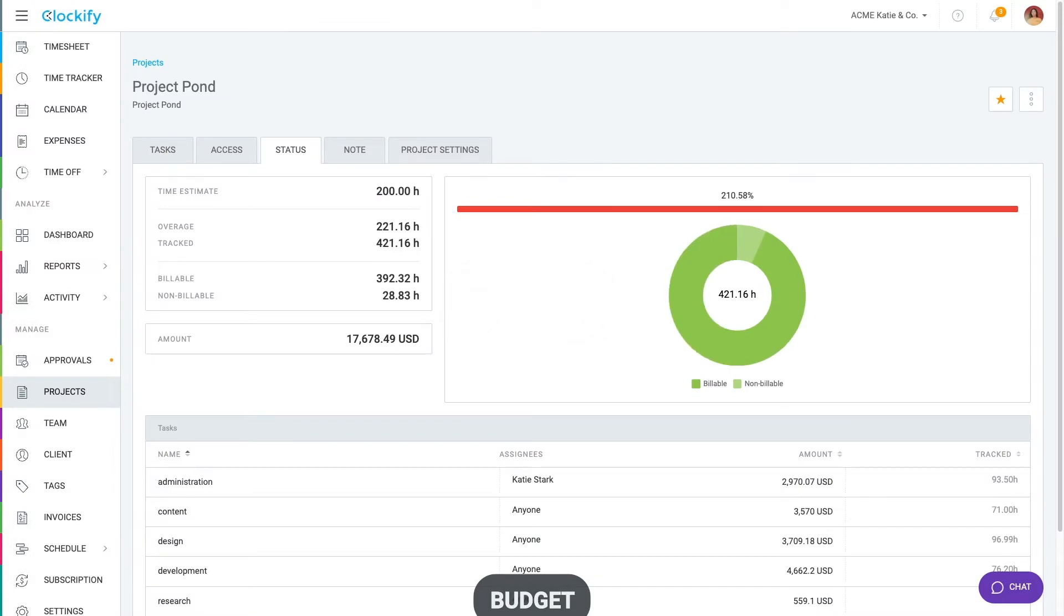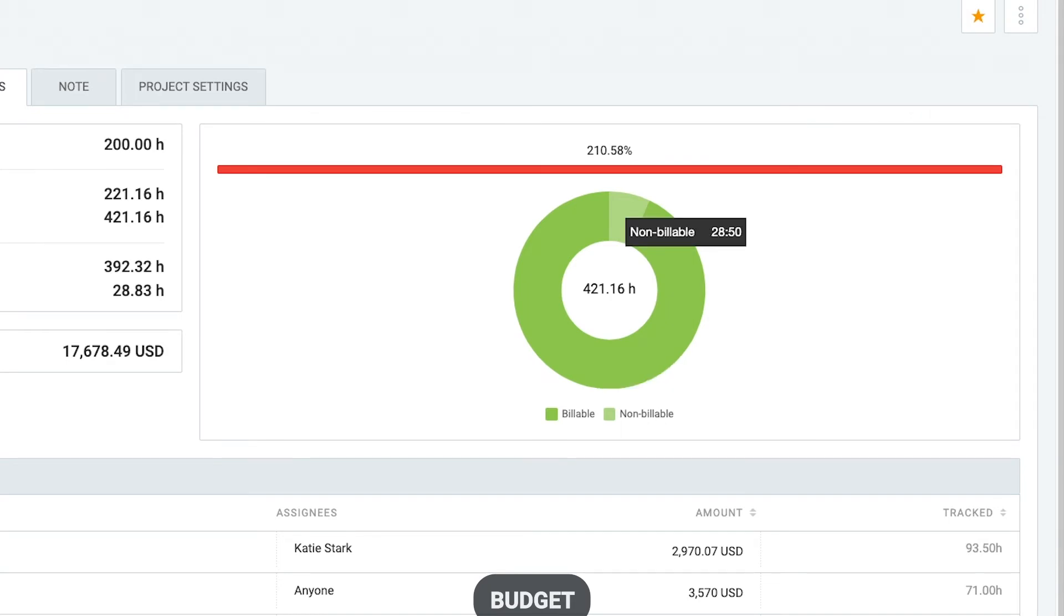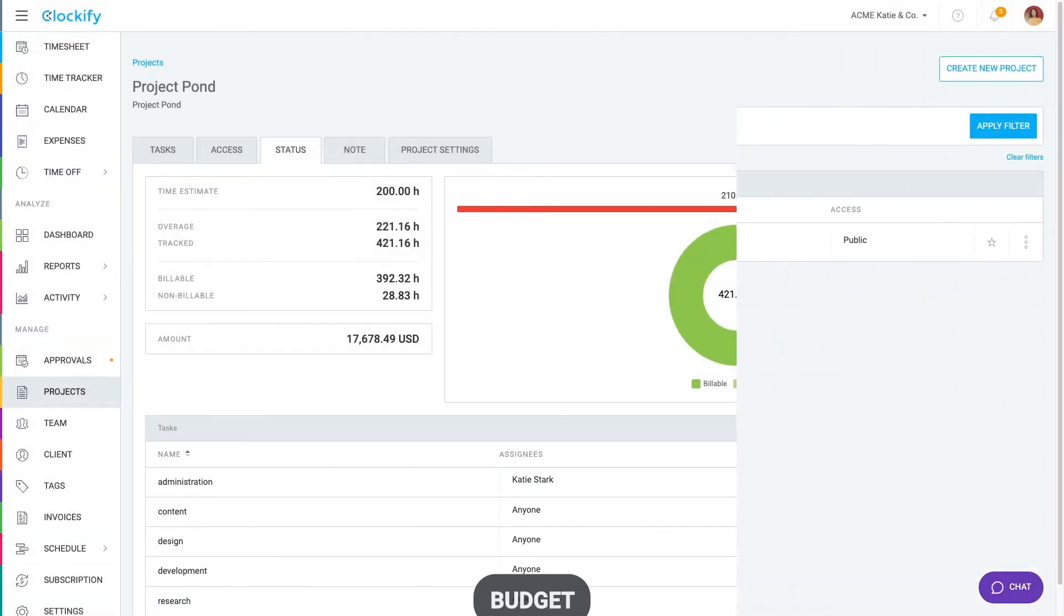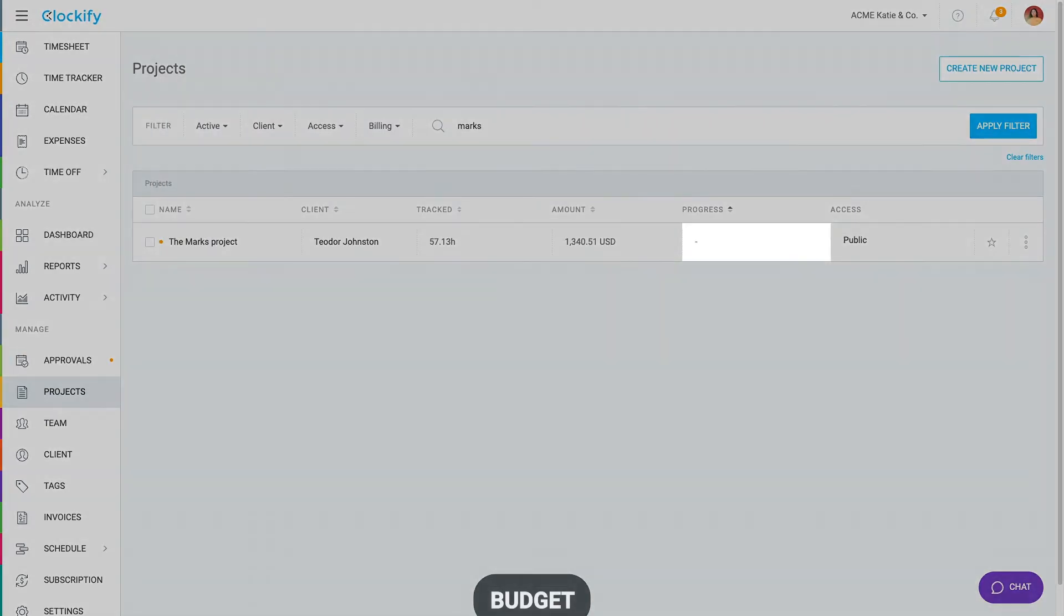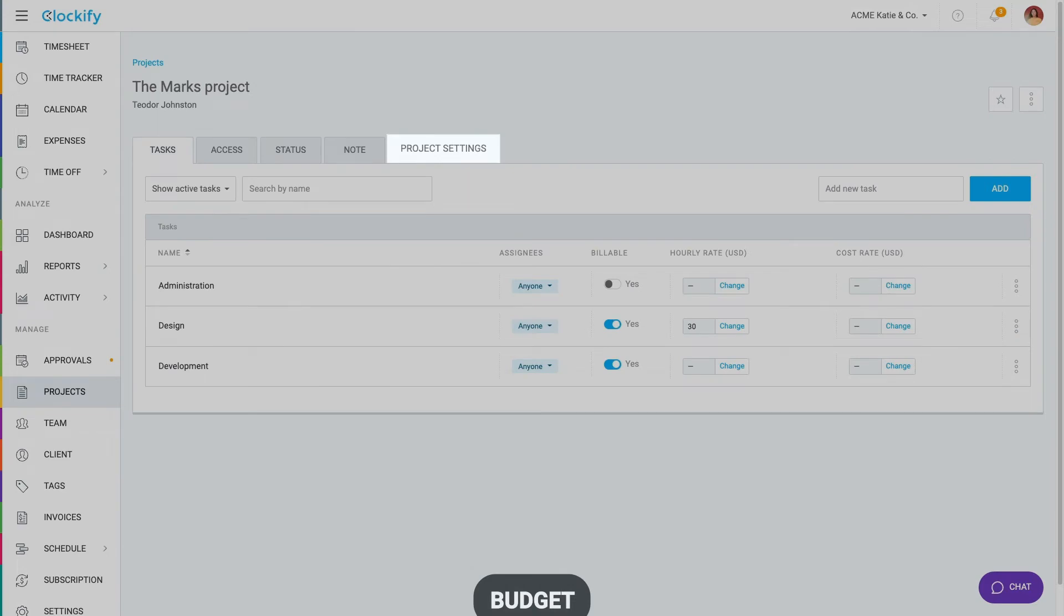Project status shows you all the information like how much time is billable versus non-billable, progress breakdown by task and so on. If you don't see a progress bar, that means you first need to set an estimate in the project settings.